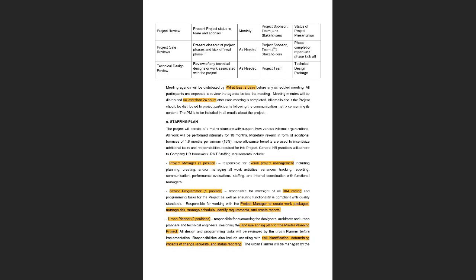And again, this is kind of a big update. We are closing down one phase. So all of the stakeholders, this project sponsor team, all of them will be involved here. Once we complete stage one, we can produce a stage one completion report, and also we'll kick off the next two phases. So that is what happens here.